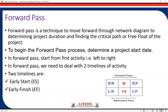In forward pass, we always start from the first activity, moving from left to right. In forward pass, we need to deal with two timelines of activity, and these two timelines are called early start and early finish. Early start stands for ES, and early finish stands for EF.